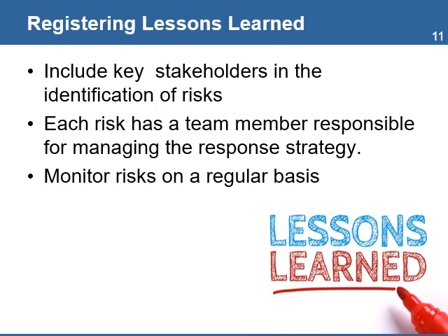At the end of each project phase or at the completion of a significant milestone, you need to capture the lessons learned in managing the project risk. For example, the lessons learned with the benefits of including stakeholders in the identification of risk, ensuring that each risk has a team member responsible for managing the response strategy, and the need to monitor risk on a regular basis. Their levels of probability and impact will change over time.